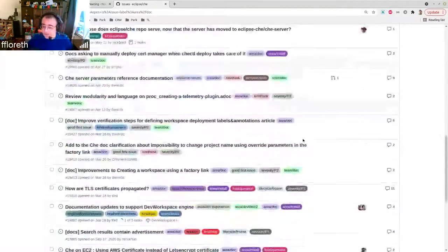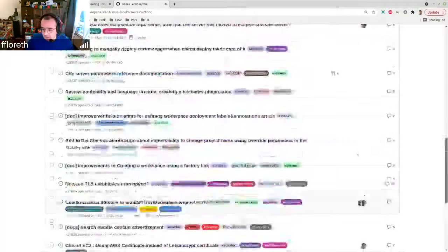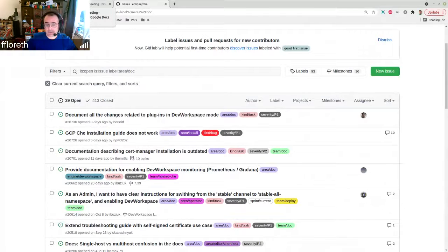So, as a consequence, some things that have doc impact enter our radar only at pull request time. So when someone from engineering is doing a pull request, that's a little bit uncomfortable for us because we cannot plan anything. So even if sometimes we lag so much behind, it doesn't help. So the question is, can we maybe think about adding this label even on issues where the issue is not completely docs, but that needs a little bit of doc?